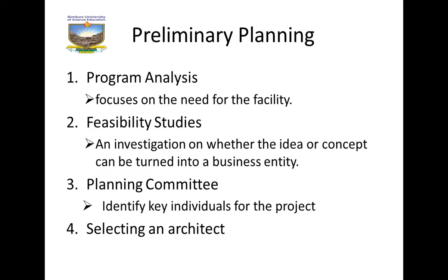This is the very beginning of your planning process. This is where you identify the need for a facility. That's step number one, program analysis. You first of all need to identify that there is a need for a facility. Once you have identified that need, you then need to check if it's feasible to build that facility. So you investigate the idea and the concept and decide if you have enough of everything to build that facility.